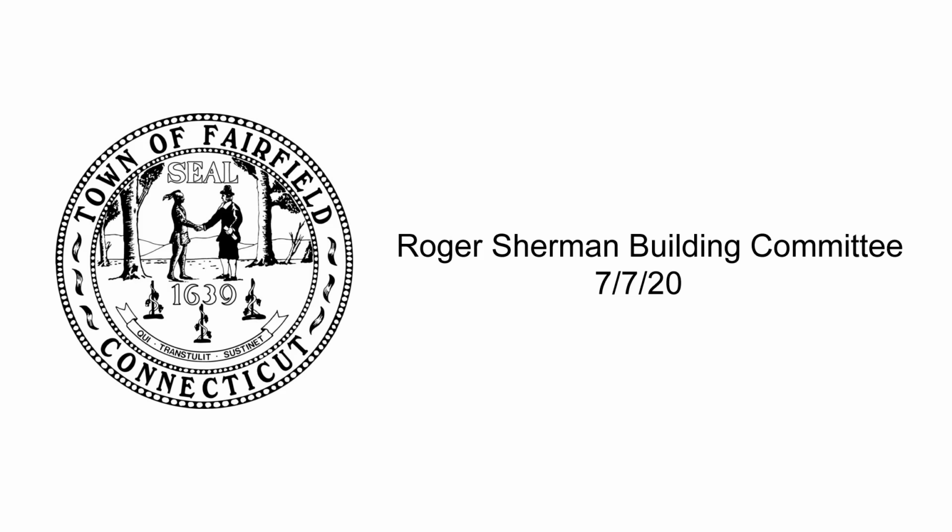So going back to the first page, we still have a project contingency. We have $31,300 left in the project contingency. And we are showing we're still to the good on the project of $27,000.